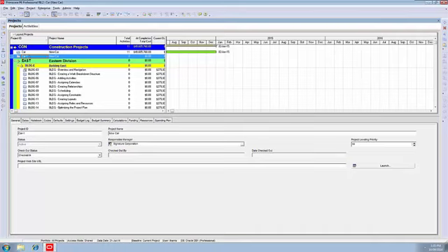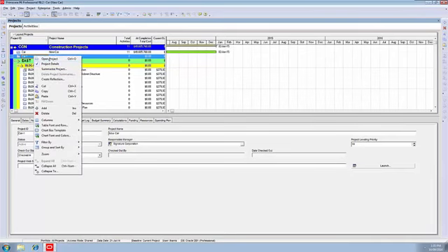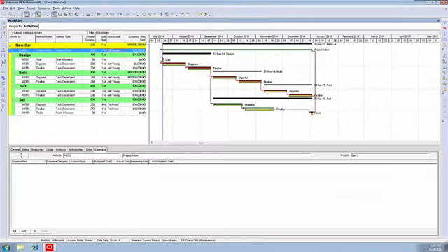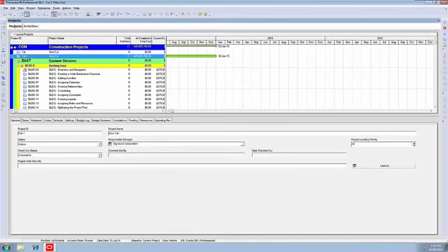And what we should be doing is changing the status of that to what if, so that we don't start double dipping on resources. To do that, notice it's grayed out at the moment. The project actually has to be open in order to change the status of the project. So make sure car1 is now open.